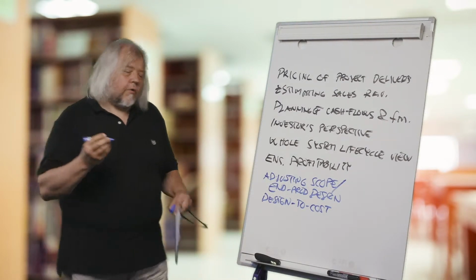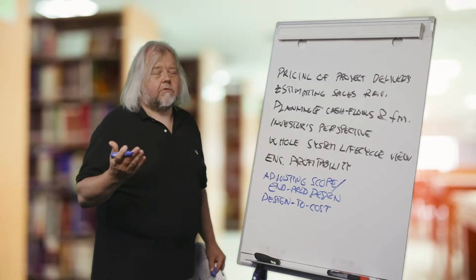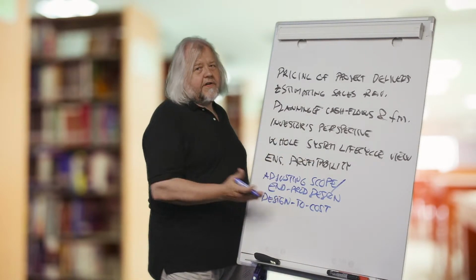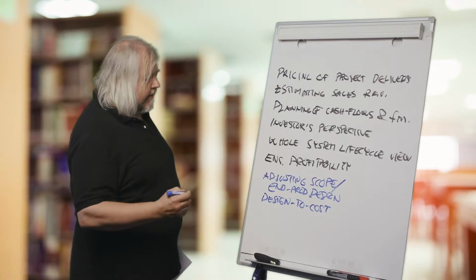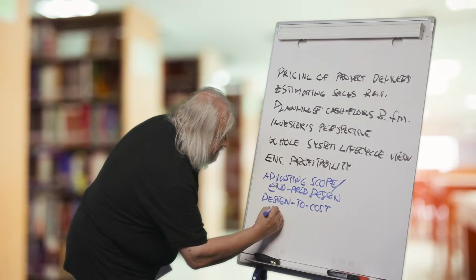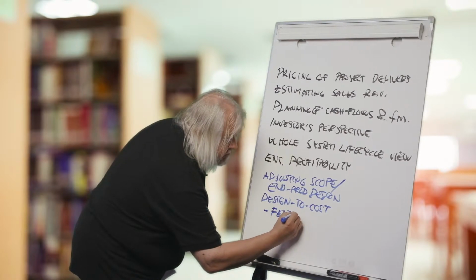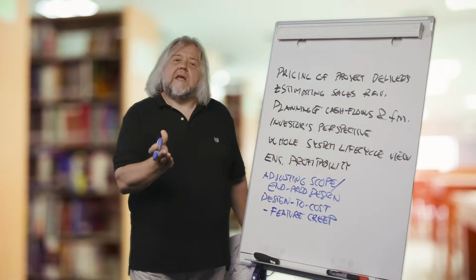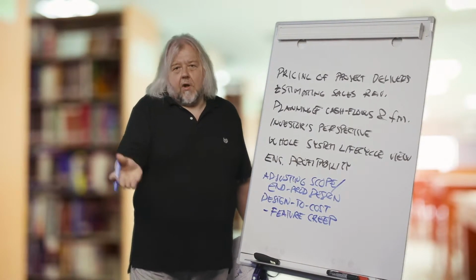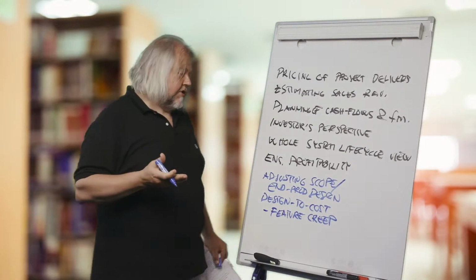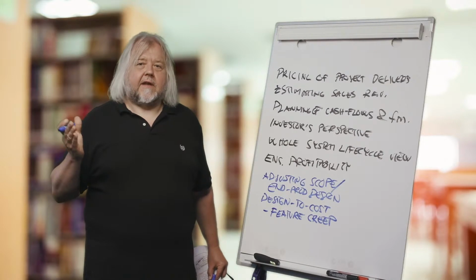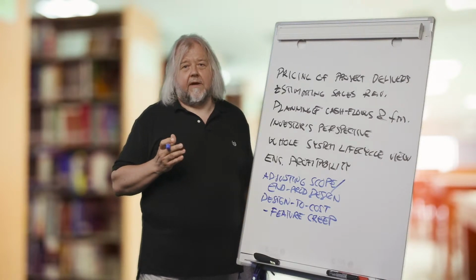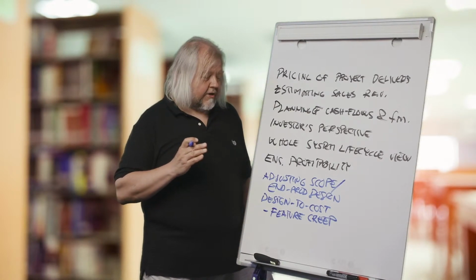Because it is well known that in projects, if we don't set any limits, for example, profitability aspirations for the designers and project personnel, there is this phenomenon of feature creep, which means that project people are adding additional features to the project which are not necessarily needed, and they can even be very dysfunctional and costly, and even cause problems afterwards.